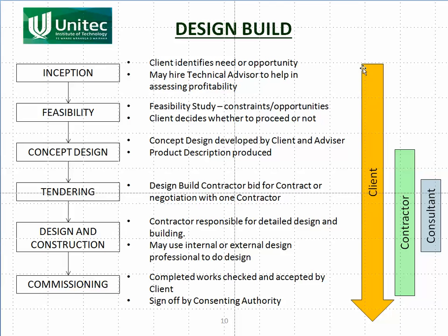The way it works is the client's there, the normal time starts at the beginning and he's there beyond it. Contractor starts in earlier and finishes at commissioning, and the consultant's only brought in there. So notice that this process is different. So you've got inception, feasibility as we heard before, but now there's only a concept design. So the design is just a concept.